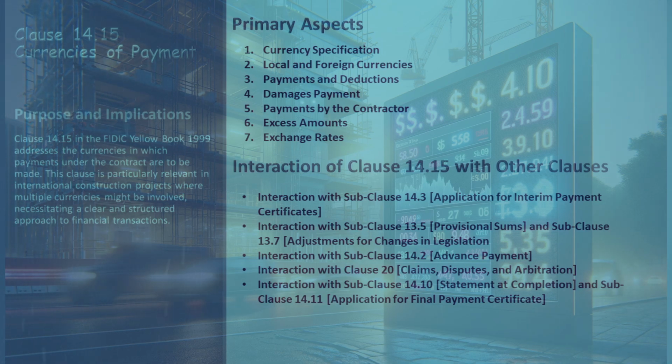In cases where the accepted contract amount is only in local currency, the clause defines the exact proportions or amounts for local and foreign currencies, along with fixed exchange rates, as stated in the appendix to tender. The clause also details how different payments and deductions are to be handled in various currencies, providing a clear guideline